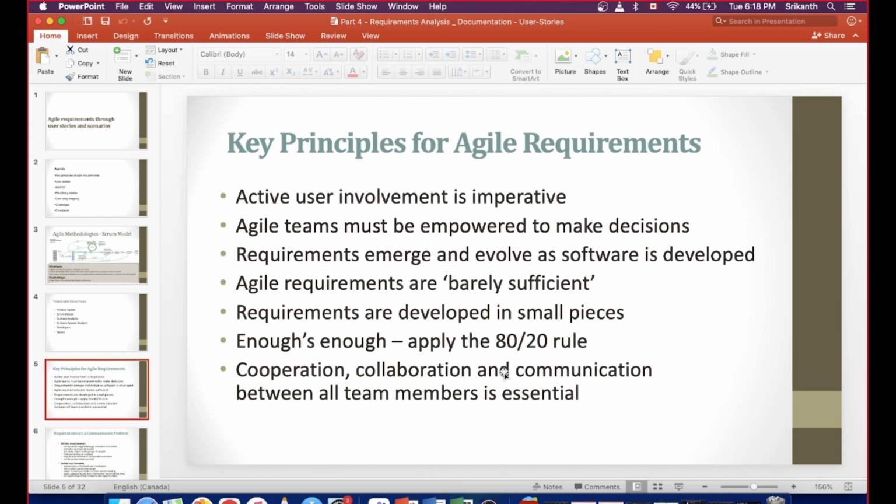And when it goes to the actual sprint, when the developer does it and the QA tests it, and if there are no bugs or defects identified, then our story card will be ready for the release, and that is called DOD. DOD means definition of done. Definition of done is the story card has been coded, very well tested and delivered. Definition of ready means the story card requirements are complete and it is ready to be taken into the sprint for development.